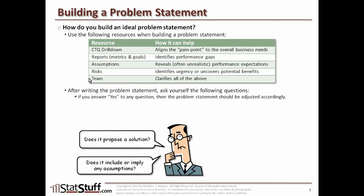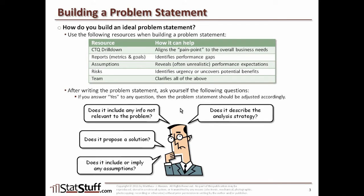Also, is there a solution proposed within the problem statement? If so, get that out of there — it has no purpose being in the problem statement. Does it include any information that's not relevant to the problem? If so, don't include it. Maybe it's important to know and you can identify it in an appendix in your storyboard or some other area, but if it's not relevant to the actual symptoms you're trying to communicate, get it out. Does it describe the analysis strategy — how you're going to try to solve this problem? If it does, put it in a separate strategy area or description of how you're going to attack the problem.